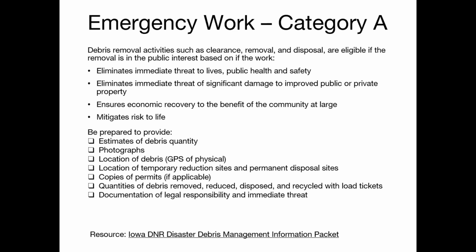Be prepared to provide estimates of debris quantity, photographs, the location of the debris, the location of any temporary reduction sites or permanent disposal sites, copies of permits if applicable, quantities of debris removed, reduced, disposed, and recycled with load tickets, and documentation of legal responsibility and immediate threat.